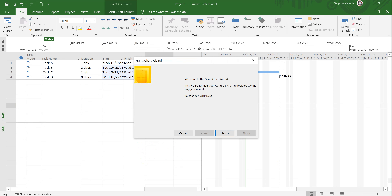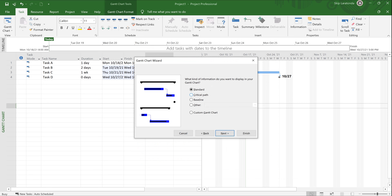The wizard welcomes me — I click Next and I want to show the critical path. If you're not familiar with the critical path: it consists of critical tasks, and the textbook definition is that a critical task is a task that, if it doesn't complete on time, the schedule doesn't complete on time — you cannot meet the end date. A lot of people say a critical task is just one that has to get done before something else, but that's not the textbook definition.